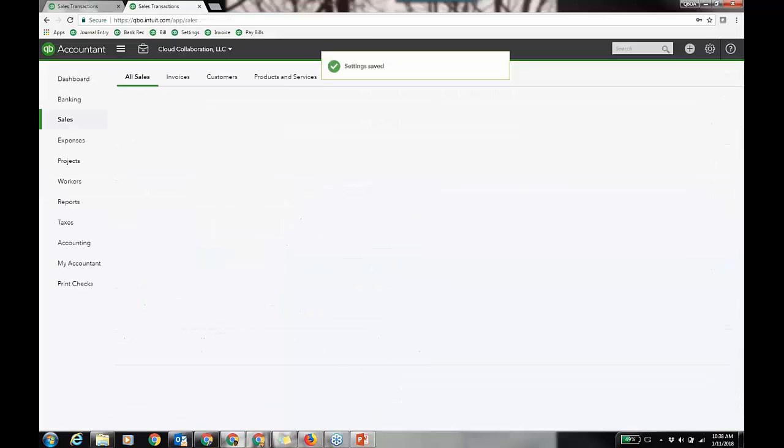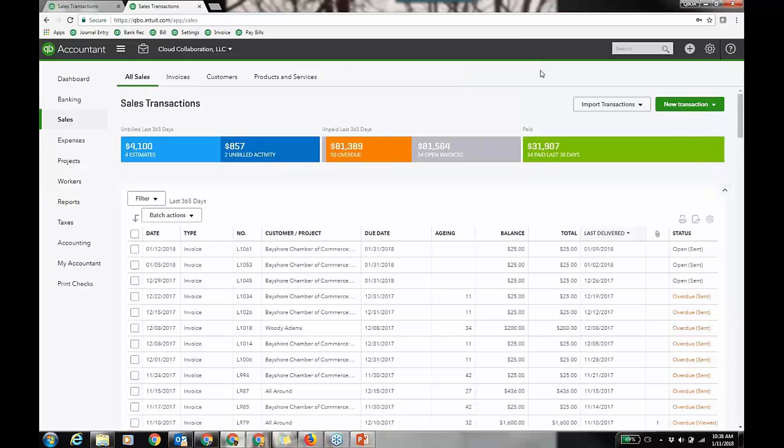That impacts estimates, so you can go from an estimate to an invoice. Right now, in most of your clients, it'll be all or nothing, so 100% of the estimate to the invoice. But soon you'll be able to go in stages, okay? So I have customers here.